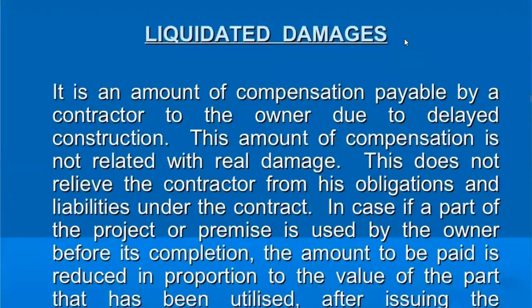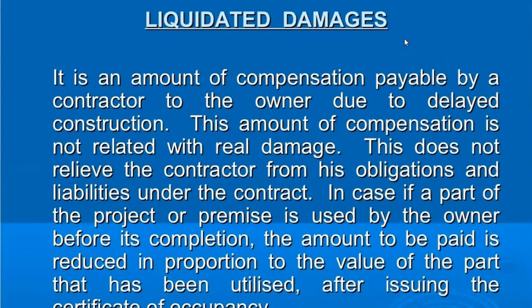What happens in liquidated damages? It means there is an amount of compensation. The amount of money will be paid because of a delay — the construction was delayed, the time was delayed. What happens to the amount of compensation? The contractor and owner need to give the amount of compensation. The amount of compensation is not related to real damage — it is just that there was a delay or a problem, and a pre-agreed amount has to be given.